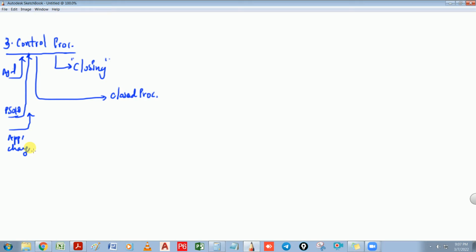And then, sure, we have our work performance data. Any comments? Output would be the closed procurements. Work performance data would become work performance information, plus change requests. And then if there is any change, we will have to update the procurement documents. Is it clear? Okay, this is clear.